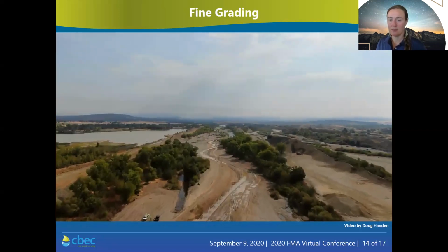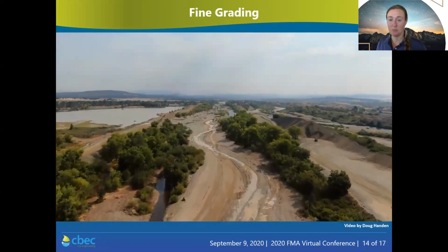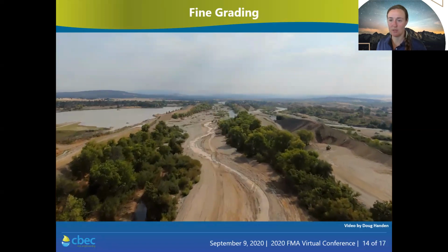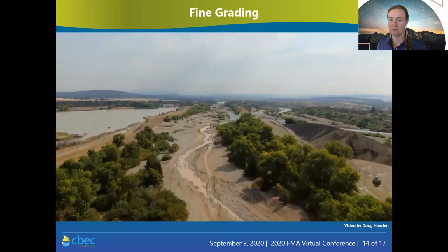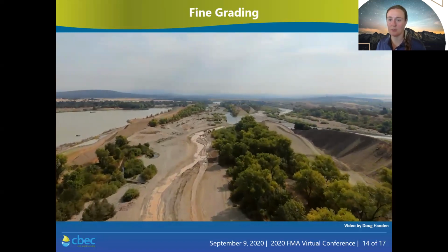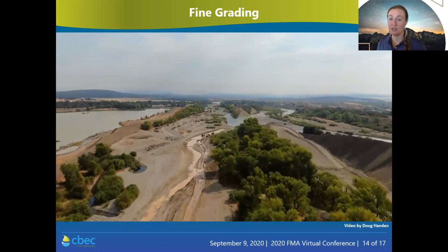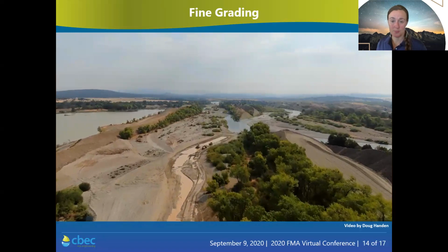Meanwhile, Tykert continues to perform rough grading activities to remove the phase 1 sediment from the middle training wall. Alcoves will be connected to this perennial channel. At the upstream end of the perennial channel, we can see the area where the infiltration gallery will be constructed at the inlet as soon as flows drop to minimum levels for the summer in September.